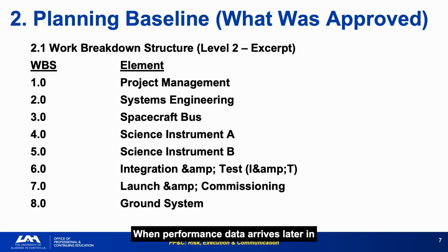When performance data arrives later in the case study, always trace it back to the specific WBS element. The cost pressure is not program level. It is concentrated in specific WBS elements that the structure makes visible.